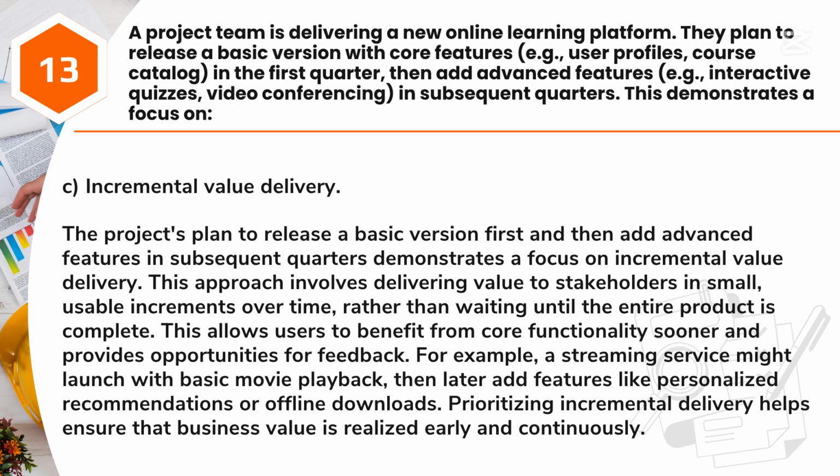This allows users to benefit from core functionality sooner and provides opportunities for feedback. For example, a streaming service might launch with basic movie playback, then later add features like personalized recommendations or offline downloads. Prioritizing incremental delivery helps ensure that business value is realized early and continuously.